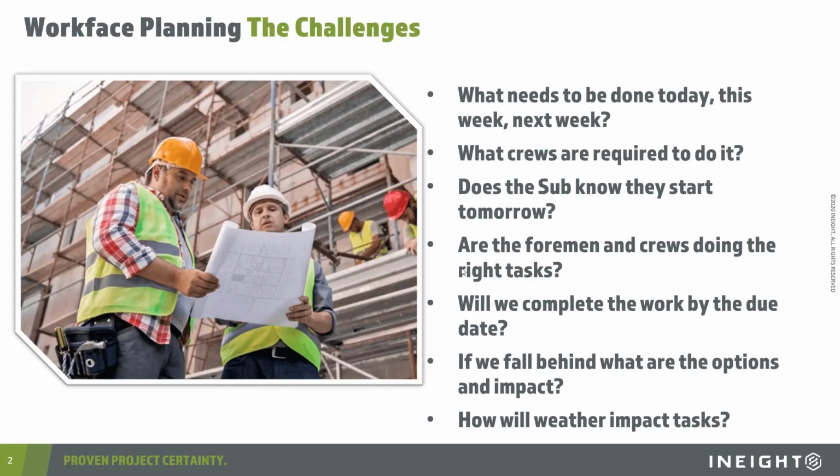So studies have shown that on average, 35 to 50% of craft workers' time is non-productive, meaning that work is not getting done due to unresolved constraints such as material shortages, hold up in another area of a project, labor shortage, and many more aspects. Though this non-productive time can never be eliminated, implementing a best practice planning methodology can greatly improve efficiency. And one of these best practices is interval planning.